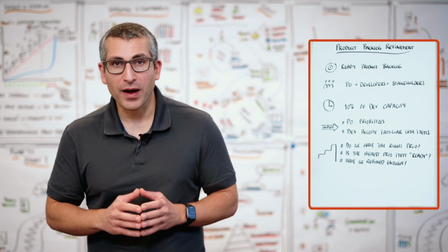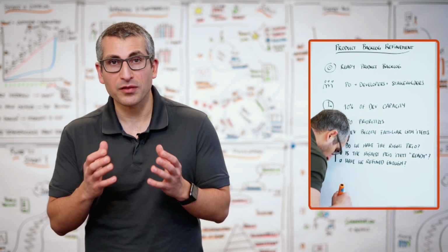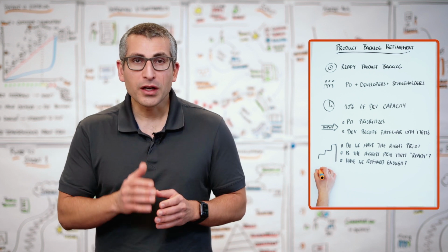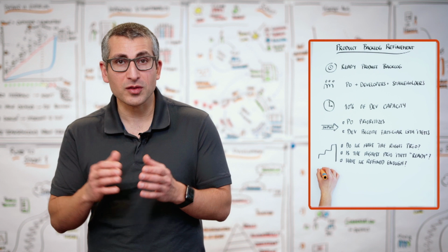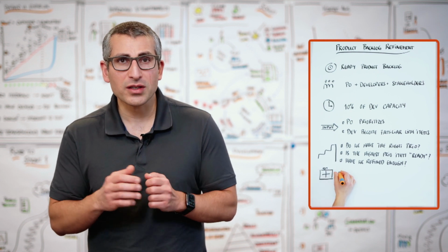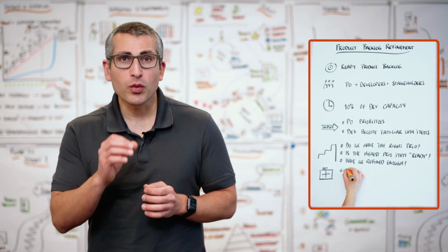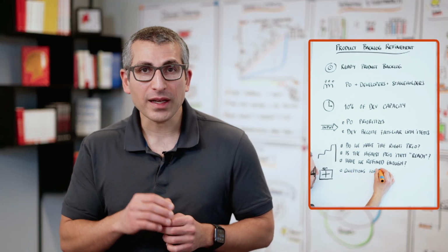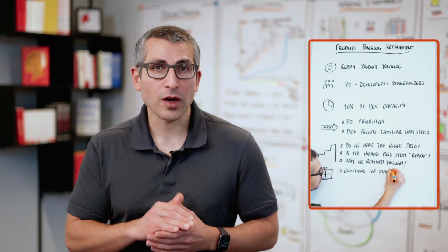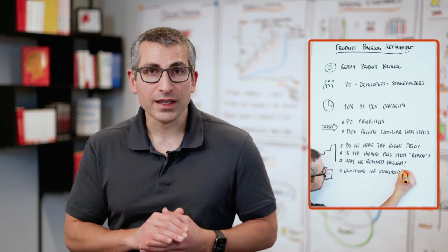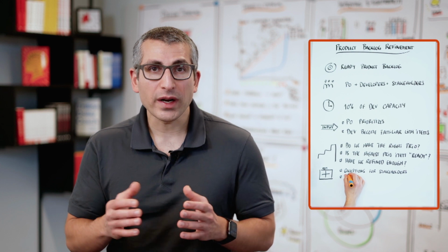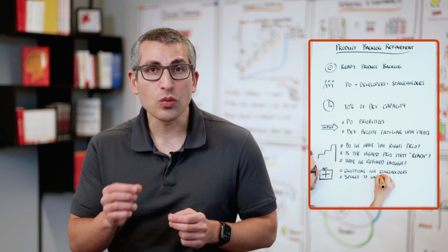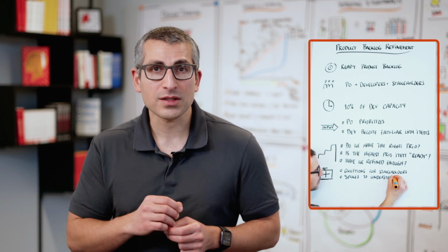After the actual refinement that we do together collaboratively as a team, there might be some follow-up work. As a product owner, you might have to go and speak to your customers, to your stakeholders, to get a better understanding around a question which you could not answer to your developers. As developers, you might have to do some technical research as a follow-up work. We refer to this technical research as spikes. One example is researching the API of Stripe or PayPal if you want to include a new payment system.